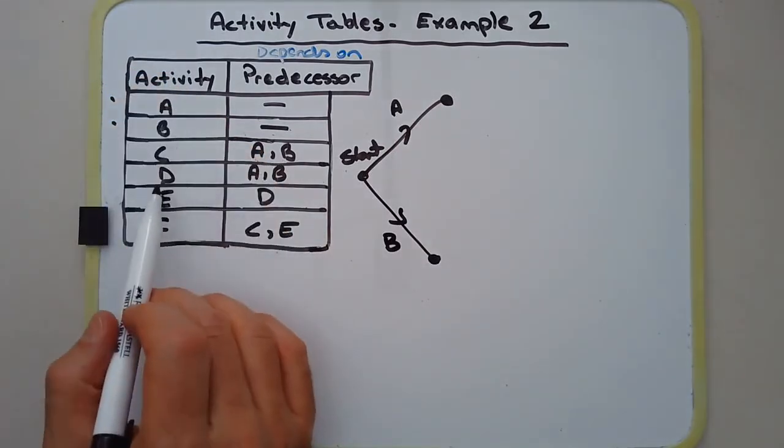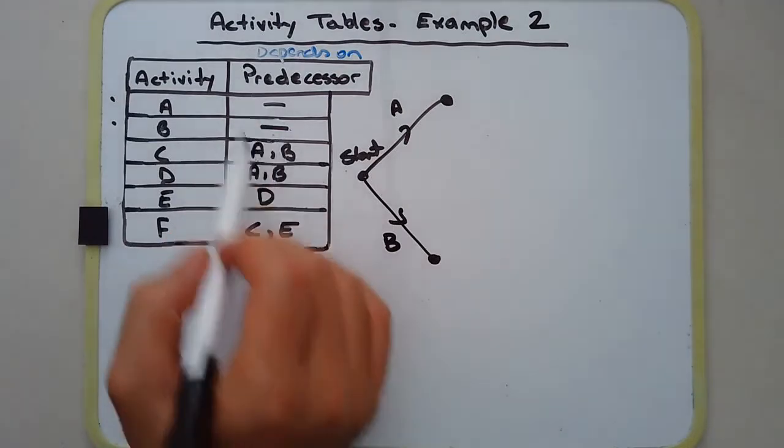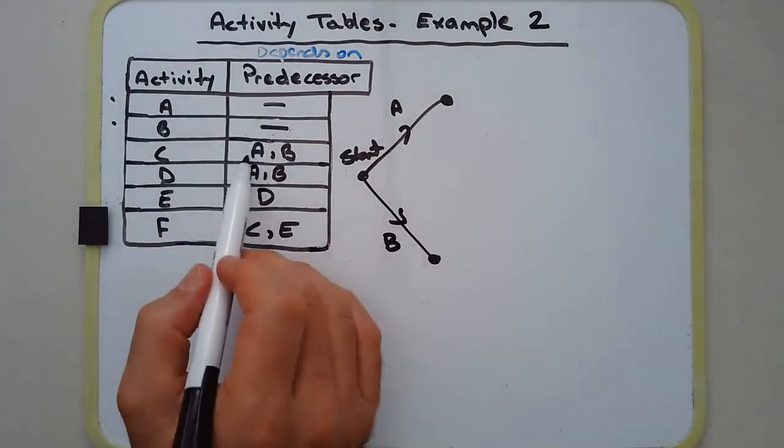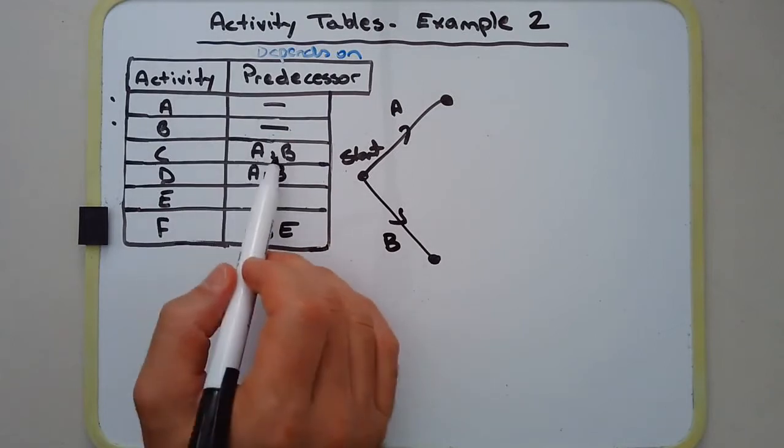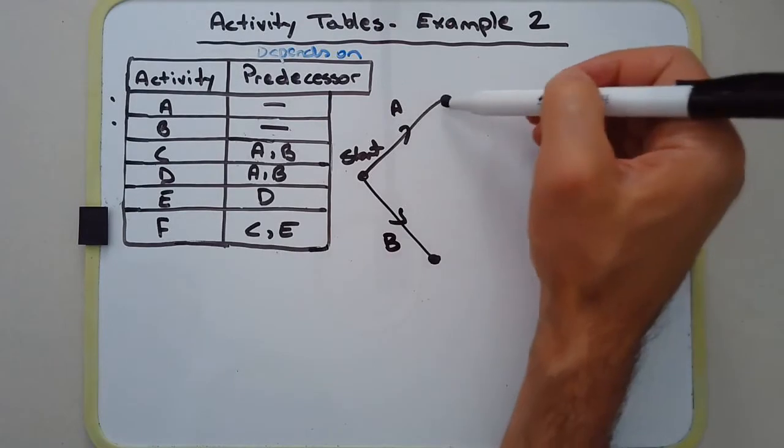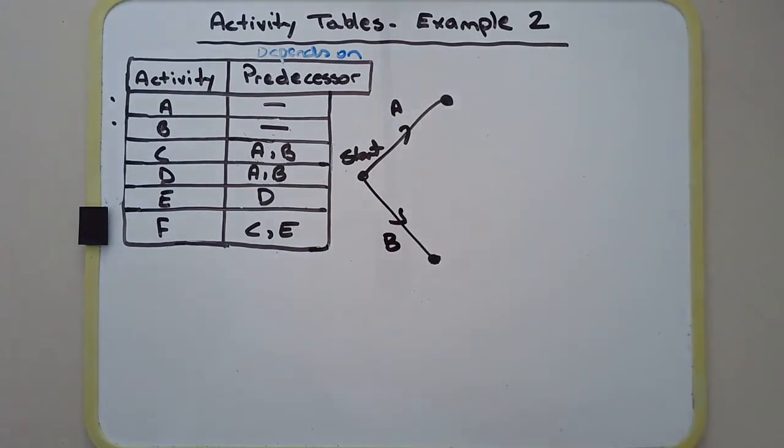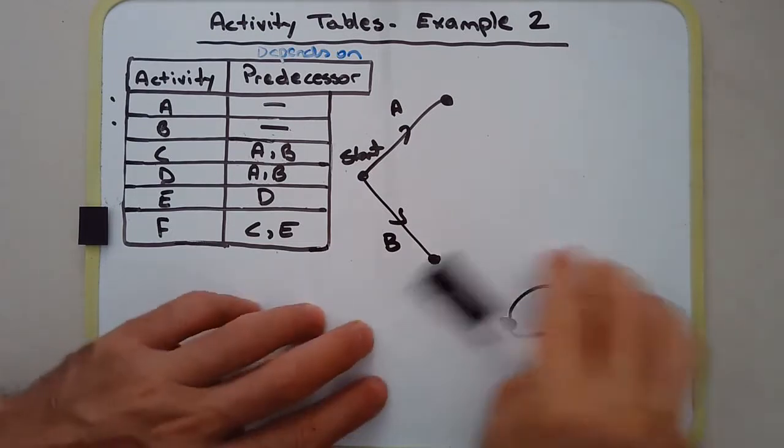Now activities C and D depend on A and B being completed. Okay, so what you'll notice is that in the predecessor column if you have two vertices listed in one row it means that they somehow have to join together. Now we can't have A joining onto B directly because that would create a multiple edge. We're not allowed to do that. Remember we can't have this sort of situation where you have two vertices basically connected via multiple edges. Okay, so that's not allowed.